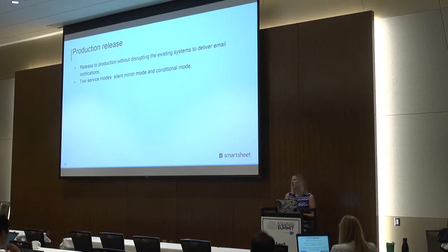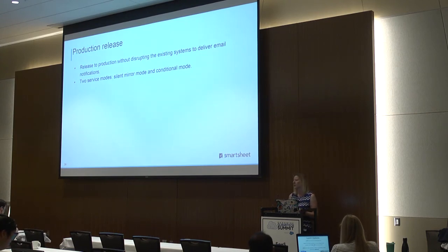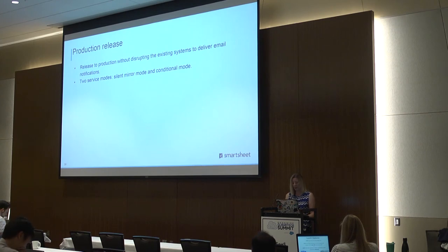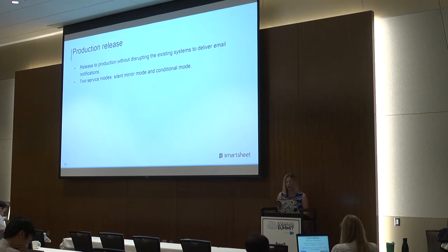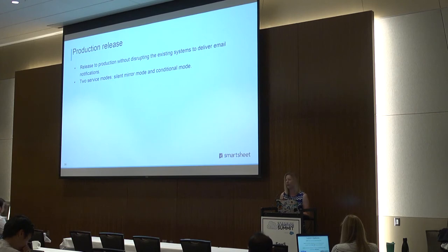Conditional mode was used to enable the notification center for our EAP customers — our early adopter program — before we rolled it out to everyone. This way, we got some early feedback and could make tweaks before we fully went live. We also had a configuration switch for each notification type. We started with enabling sheet change notifications, and later added sharing, update and approval requests, and reminders. Starting with one type allowed us to get to market sooner and ramp up slowly.